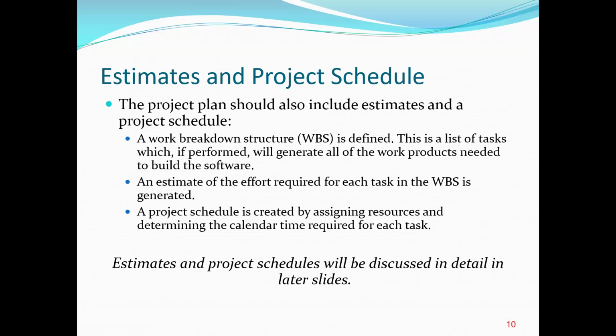Some tasks can be done in parallel, at the same time. Two or more tasks can be done at the same time. But there can be some tasks where one task has to be performed in order to do the next task. For example, building a house, we cannot start to install the windows if the house has no foundation.